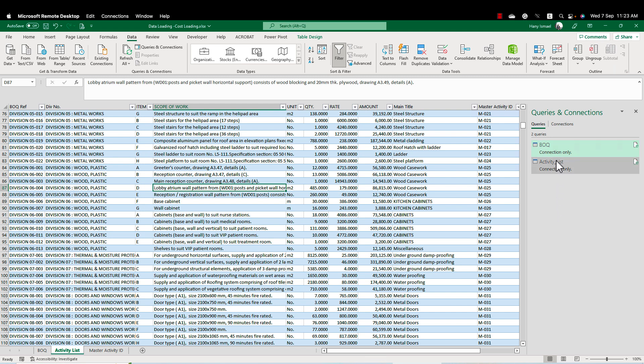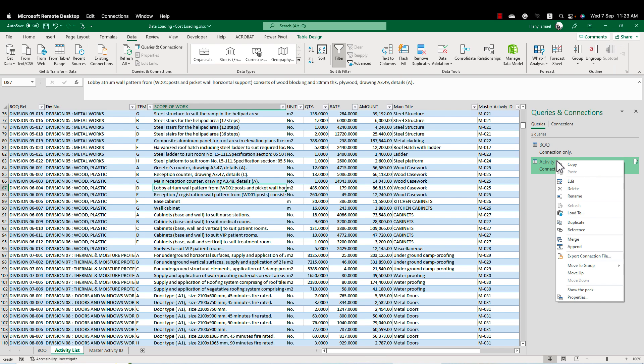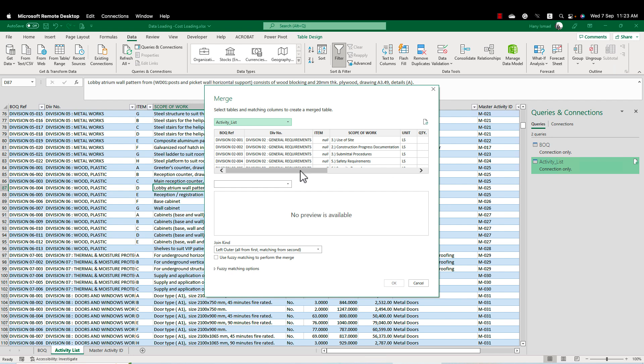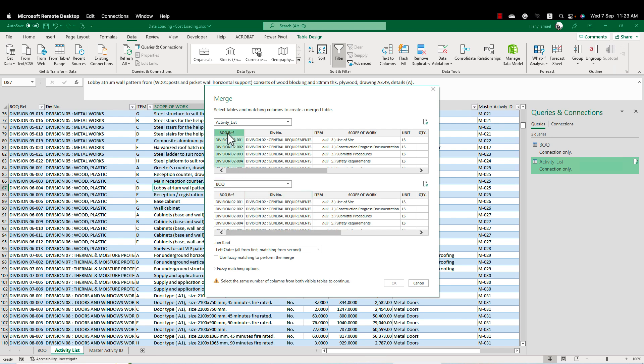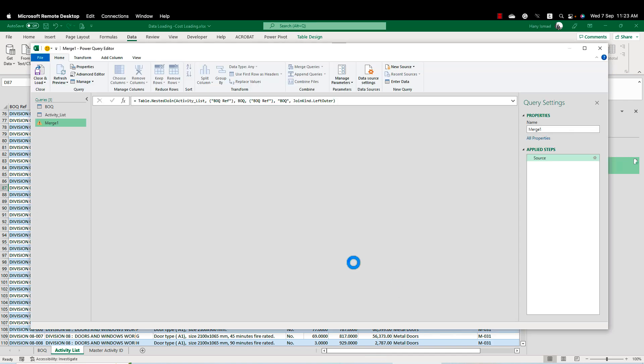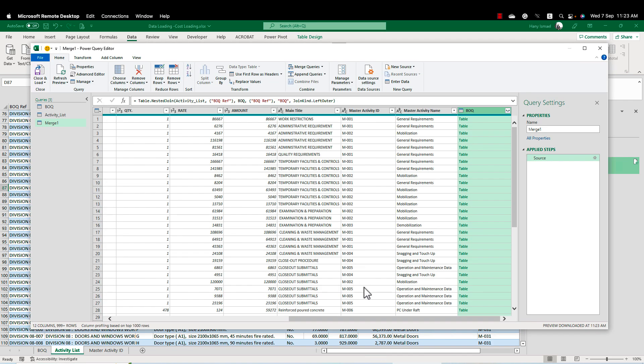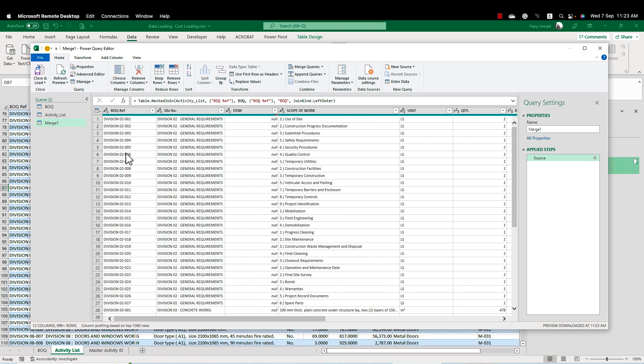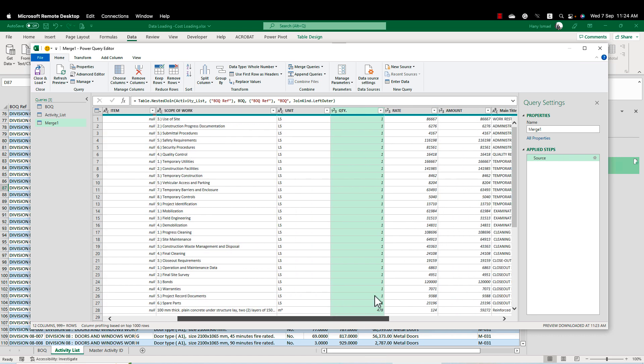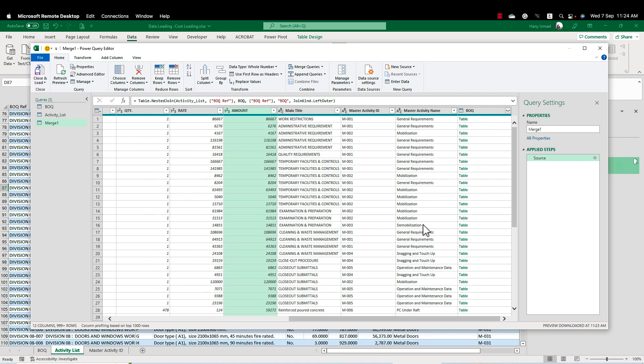So simply I can now right click here and click merge. So I'm going to merge these two tables. I'm going to merge the activity list with the BOQ. Then I'll click here the BOQ reference here and the BOQ reference here. So it will be one table connecting these two queries. This is my first table, my first query.